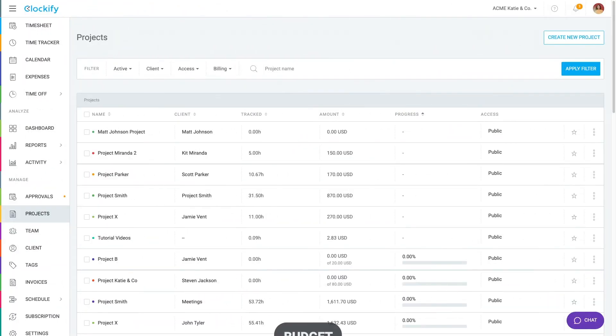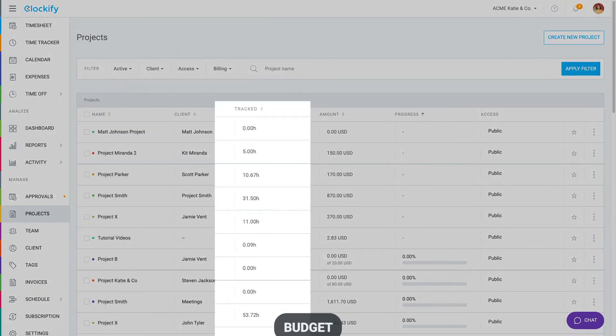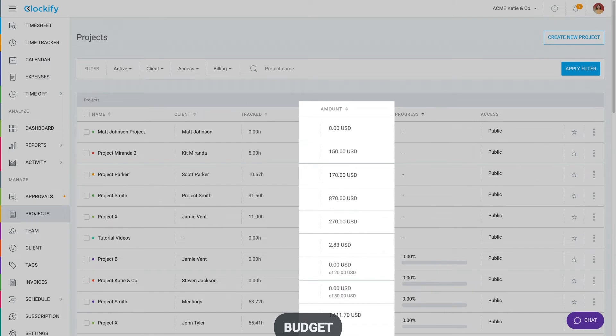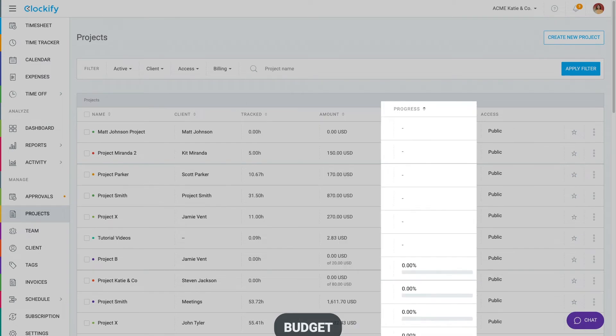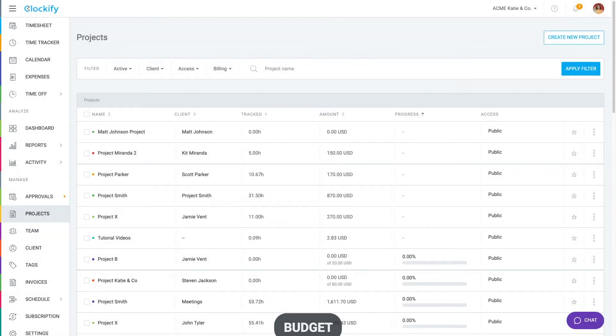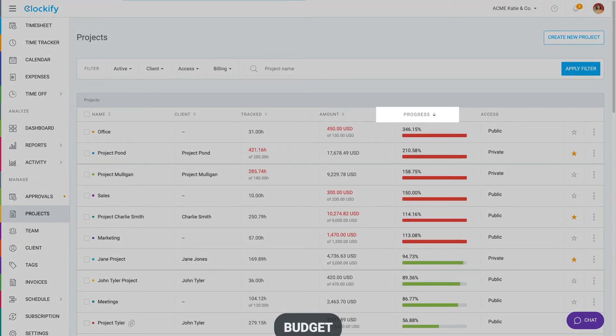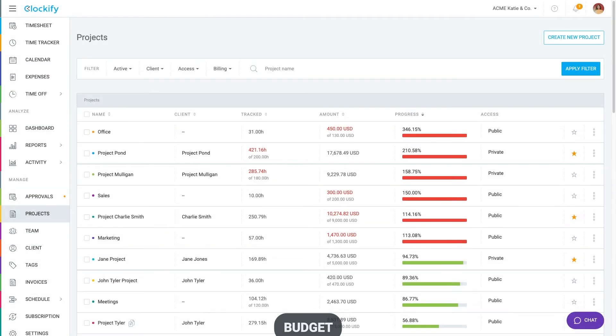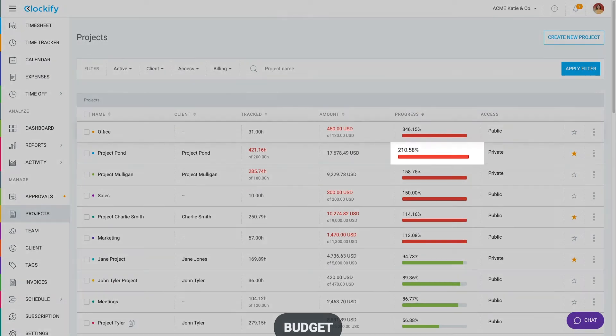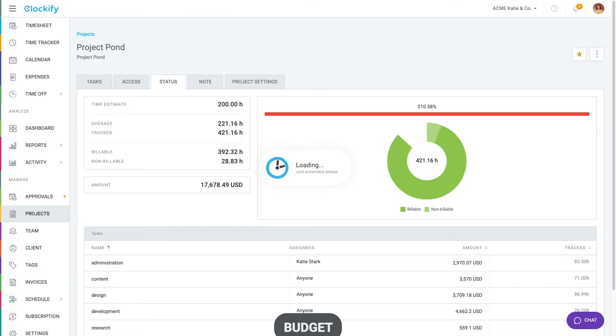Let's now cover how you can track budget and progress on projects. The project page shows all your projects, time tracked, amount earned and progress bar. You can sort projects by clicking on the progress column to see what's about to go over budget at the top. Click on some project's progress bar to see more details.